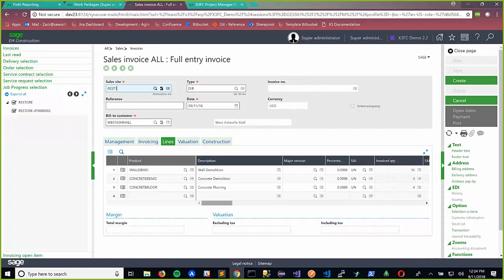If there's more than one, you can choose to bill more than one on a single invoice. And we go out and get all the unit price items that have been logged on those job progress. The job progress, once again, being that I've gone out and inspected how much work I can do. These are marked as units, but let's say they're linear feet of wall demolition. I've done, oddly enough, 16 linear feet of wall demolition, not very much. What can I bill that for?